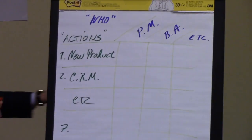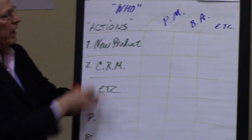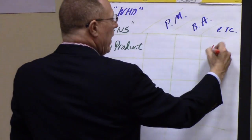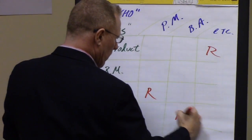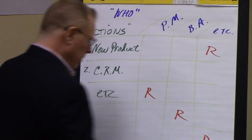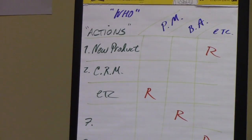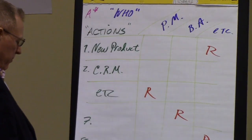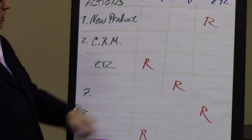Leveraging those symbols, the suggestion for most methodologies is to work in a vertical fashion so that if the meeting ends, we at least leave the room knowing who's going to be responsible for each action — that uses what's called the big red R. If there's one person paying for it all, it's a good idea to footnote that. If there are separate groups or business units accountable, you can mention those accordingly.